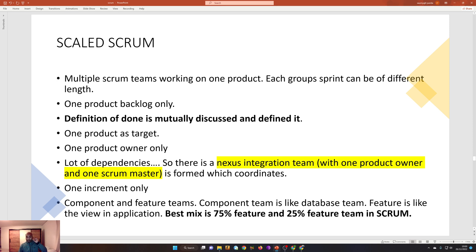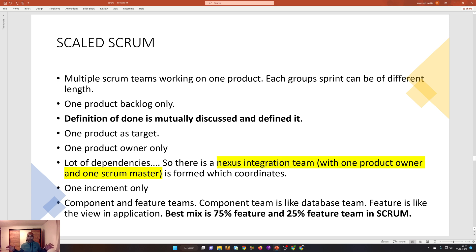There is only one increment. There are component teams and feature teams — two types of teams — and a 75/25 percent mix of the two is good for scaled scrum. For example, multiple teams like a master data management team, data quality team, data engineering team, data analyst team, and data reporting team all working towards one goal. That is scaled scrum: one product owner, one scrum master, and small groups of people all working precisely towards one goal.